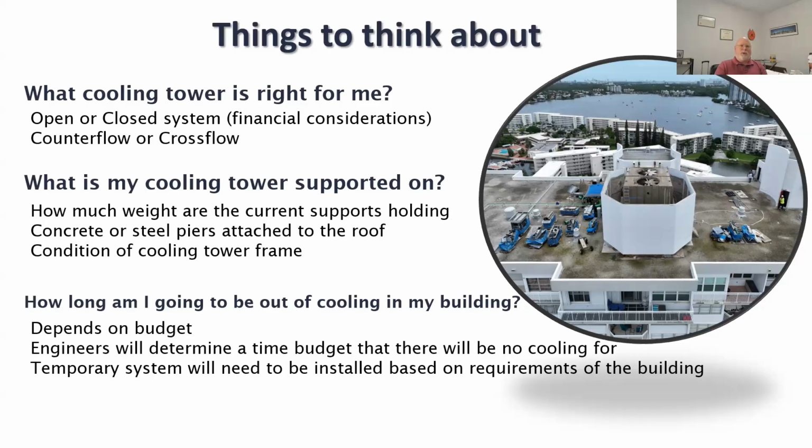Cooling towers, I simply don't have that option. And again, as I've said, with code changes, the wind loading is significantly higher. They've got to be beefier structures. They weigh a lot more. The forces that they have to withstand are a lot more. And again, if I'm replacing a tower that's 20, 30 years old, even if I replace it with an identical tower, the weight is going to be enough that I have to address the structural in one form or another.